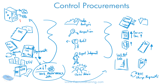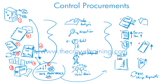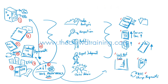To summarize: the inputs to Control Procurements are the project management plan, project documents, procurement documents, agreements, approved change requests, work performance data, enterprise environmental factors, and organizational process assets. The tools and techniques are data analysis, inspection, audits, expert judgment, and claims administration. The outputs are closed procurements, procurement document updates, project management plan updates, project document updates, work performance information, organizational process asset updates, and change requests. That is a review from Crowd Trainings of the Control Procurements process in the 6th edition PMBOK.